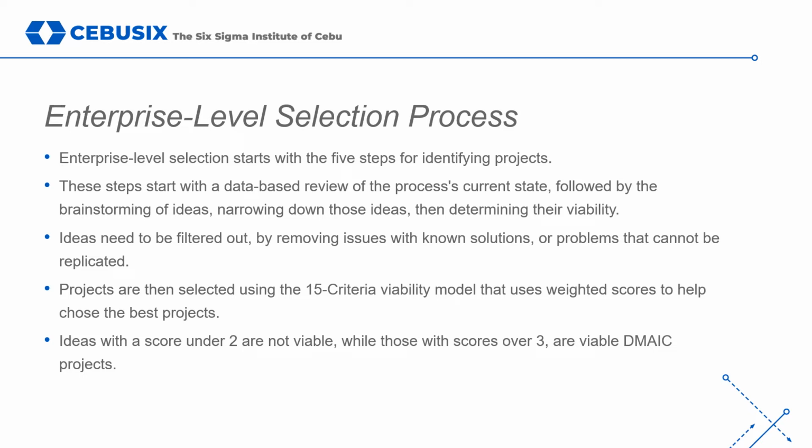One of the best ways to prioritize projects is to create a selection matrix with defined criteria and a numerical ranking system. Teams can choose to create their own criteria for a project selection matrix, or they can use a 15-point viability model as defined previously. One benefit of the project viability model is that it provides some weighting, letting teams make some criteria more important than others.